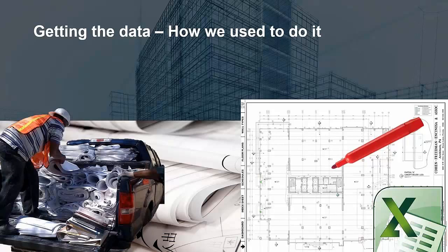But in the past, how did we typically collect data? Well, we did it the way that everybody else did, right? Piles of paper, then maybe we moved to some sort of electronic documents and used a software like OST to be able to do takeoffs. But inevitably, it was a pretty manual process, and all that information then was dumped into Excel at the end of the day. We took that information, we compared it to subcontractor bids, maybe we applied some unit cost to it that we had built up over the years, and we used that information to vet numbers, to put together thumbnail estimates, and to be able to give owners prices on projects as we approach them.